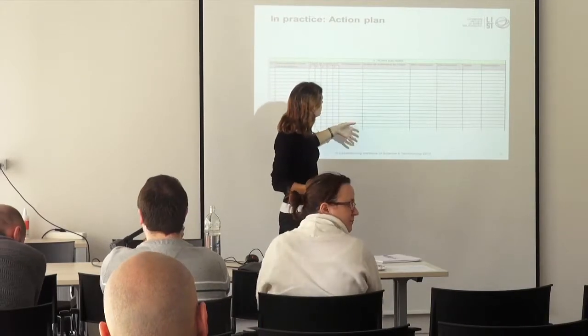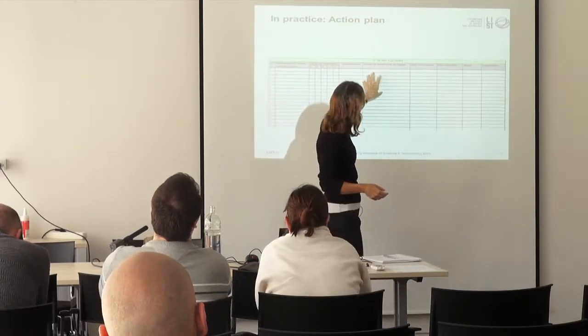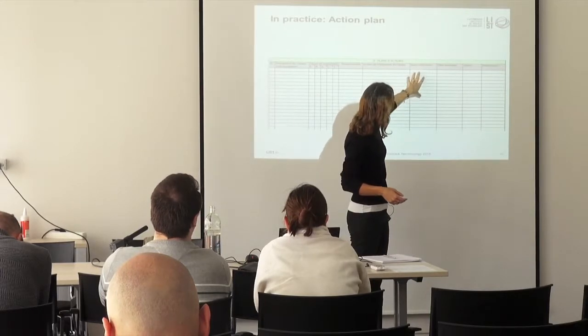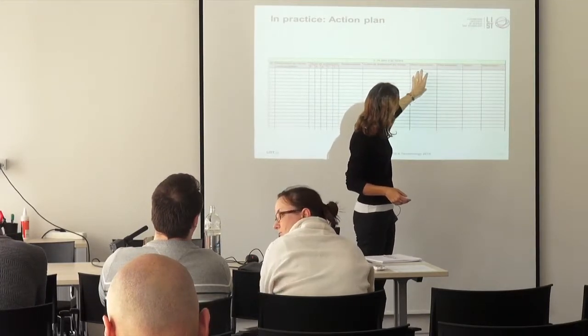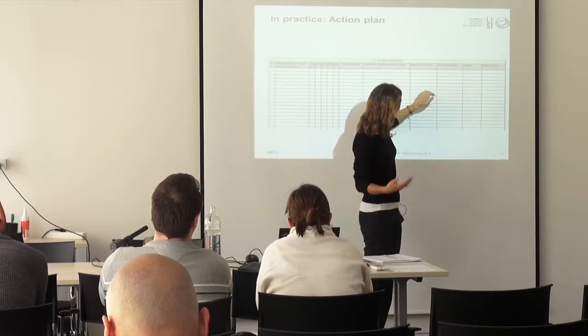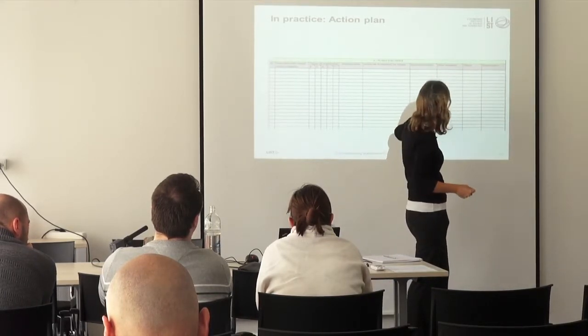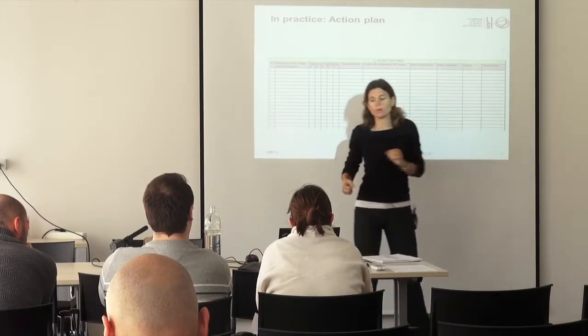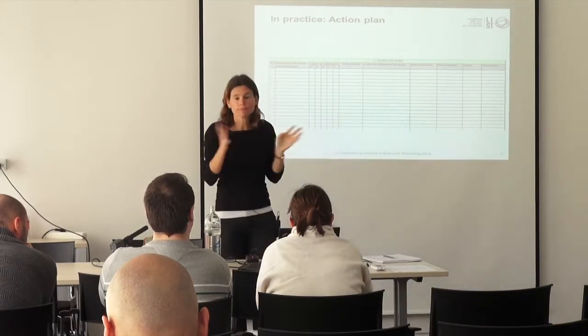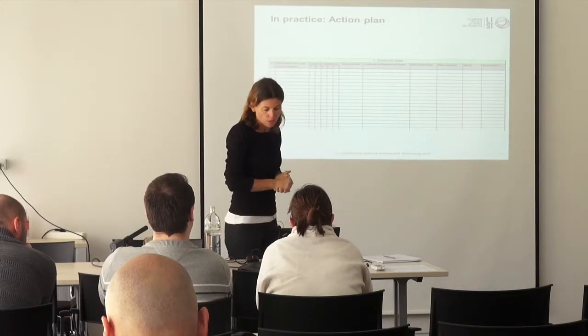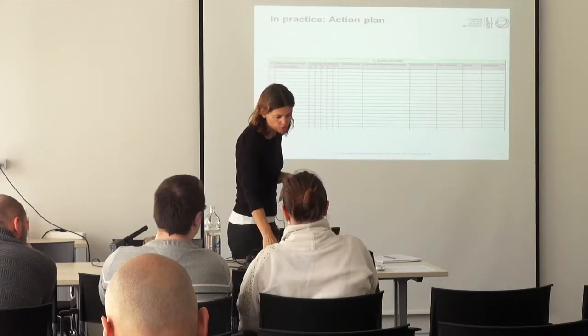Who is responsible for that action? The description of the action in detail. When it's going to be implemented, what is the effect I expect to get when that action is implemented, the status, and some remarks. So basically, a simple sheet to follow up on the action plan.